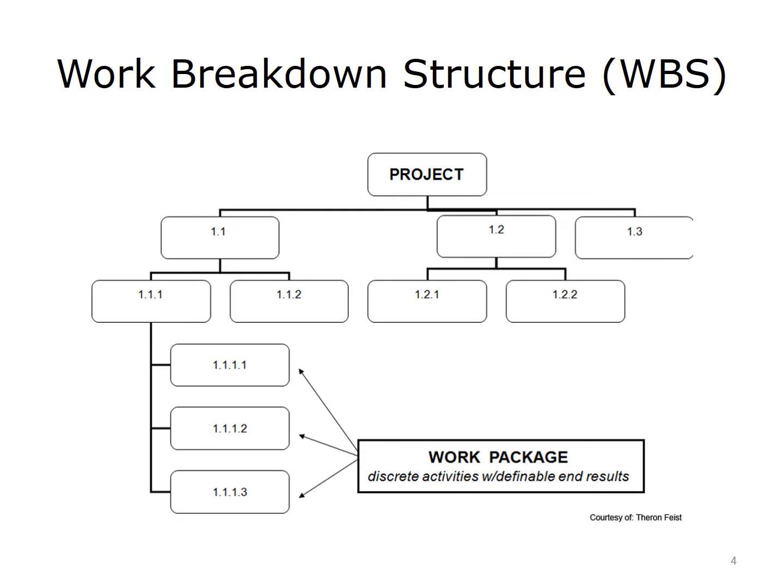The WBS is the foundation from which most planning stems. It provides a graphical view of a project and organizes and defines the entire scope of the project. The project team will analyze each work package of the WBS to identify all the activities that need to be performed. This information will ultimately help develop the schedule and make key procurement decisions.